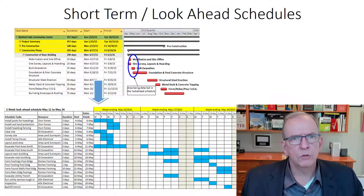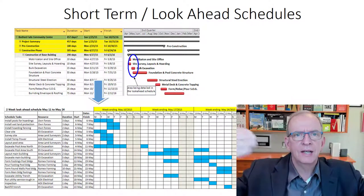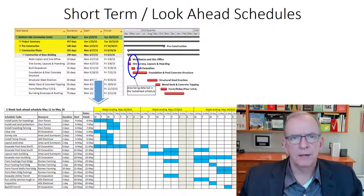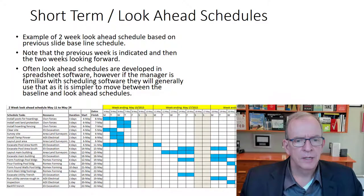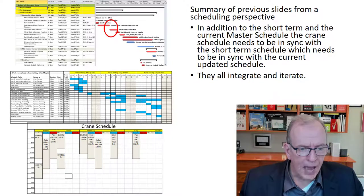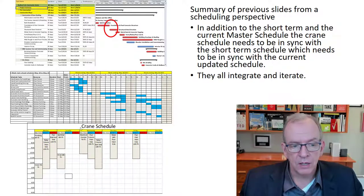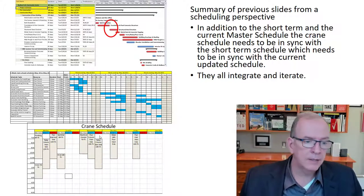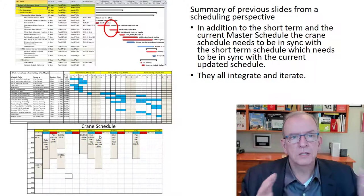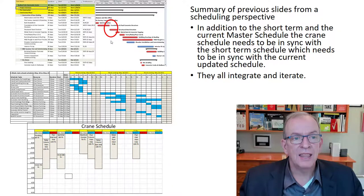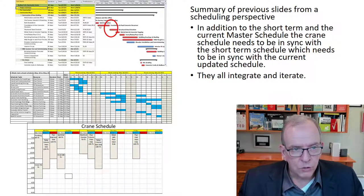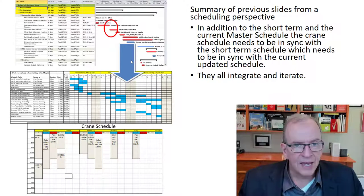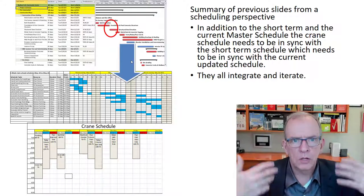We have more clarity as we get closer to the work, but the goal is to keep increasing that clarity as we get closer and closer, strengthening that commitment in the process. We need to coordinate with things like our cranes, our material hoist, our excavating equipment. We have to prioritize those pieces of equipment, particularly those on the critical path. This short-term schedule, which is filtered out of the baseline schedule, is getting that data — and at this point in the course, this should become clearer to you.